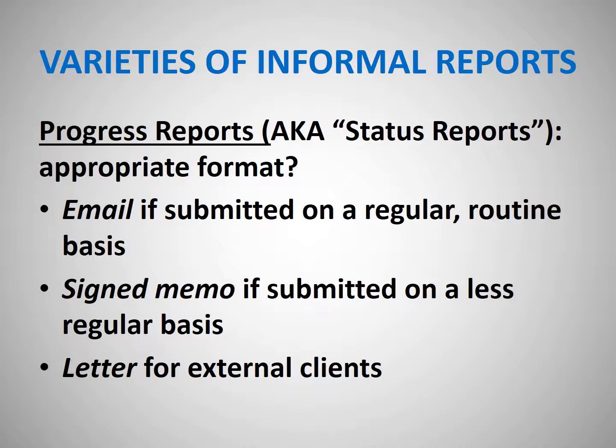Okay, what format do we use for progress reports? Well, if you're going to be sending several progress reports over time, and it's not too long a length of time, let's say it's a year-long project, and you agree to send monthly updates, monthly progress reports, you might do that by email. So we've got regular and routine submissions. Then you can probably use email.